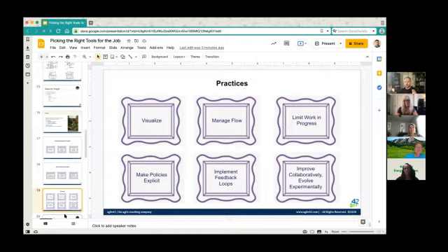On the other side of the bell curve, you're overwhelmed. There are too many things. You're spending more time trying to manage your tasks than you are actually doing your tasks. You want to find that sweet spot. Limiting that work in progress helps you find that sweet spot. We could talk for hours about work in progress. That's the short version of it. But you got to do it.